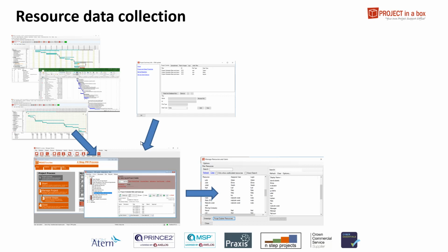So we look for example, M West in one project and Malcolm West in another project, and we point them both to the same resource, to my user. And that's done using a lookup list, which is set up once centrally and then works on every plan. So we can point those different source datas to one user in the system. We'll talk more about that in the detailed video later.